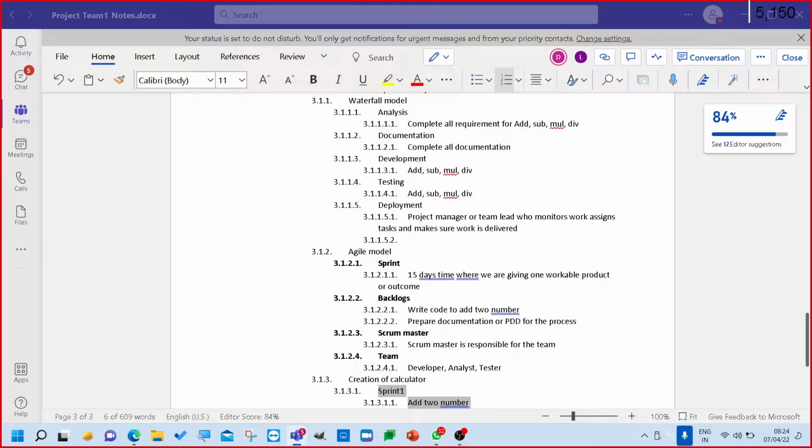And if there are any modifications or updates needed after each sprint, those will be performed in the next sprint and then given again to the stakeholder, right? Exactly. We already have addition functionality added, subtraction added in the second sprint. Now they bring in a query that in addition there are some extra features you need to add. Then you can say that the timeline is already fixed.